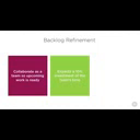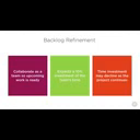But, adds Alan, "I often find that number to be a little high, especially after a project has been underway for some time and the backlog has started to become more understood. Let's start with 1 hour per week, which will give us 2 hours in a 2-week sprint. Since your team is beginning your sprints on Wednesdays, Fridays may be a good day for this session since it falls relatively evenly throughout the sprint, and refinement sessions can be pretty relaxed, making them a nice Friday afternoon activity for the team."